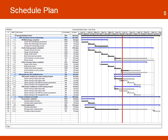A tool used to plan and manage the schedule is the Gantt chart. The Gantt chart lists all the project activities and groups them by output and outcome. The chart shows horizontal bars that describe the duration of each activity, the start and end time, and the sequence and dependencies among the activities. This tool facilitates the visualization of the project and helps identify progress.